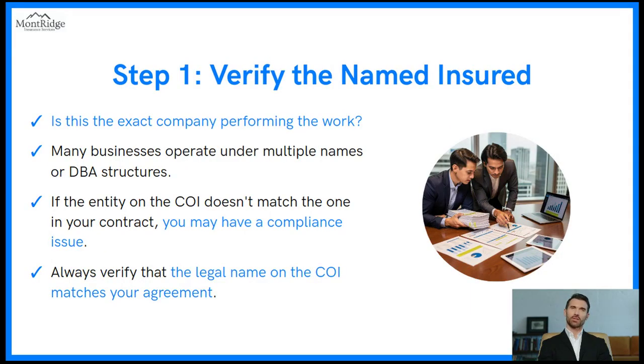Verify the named insured. Is this the exact company performing the work? Many businesses operate under multiple names or DBA structures. If the entity on the COI doesn't match the one in your contract, you may have a compliance issue. Always verify that the legal name on the COI matches your agreement.